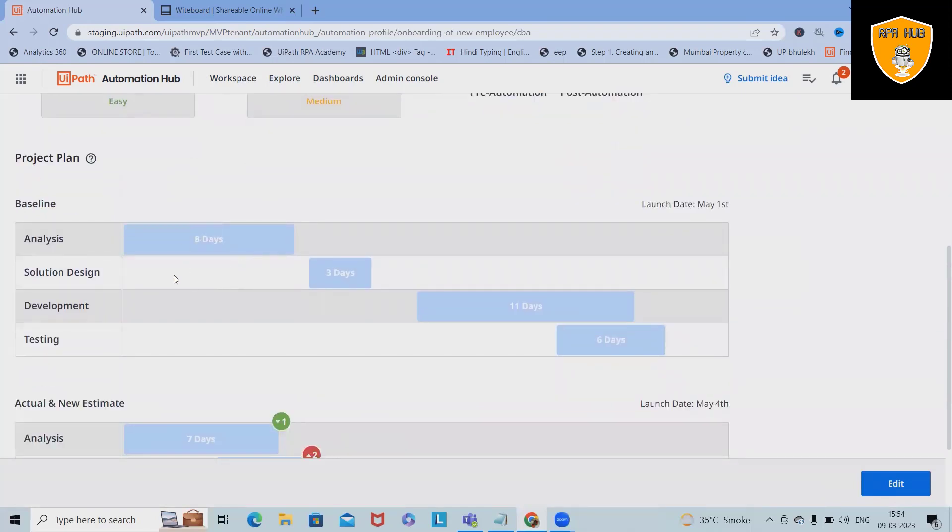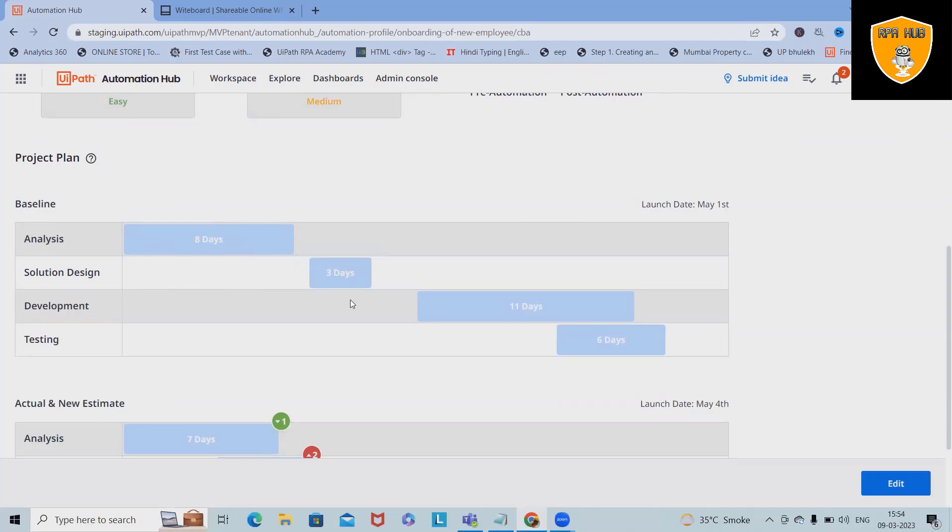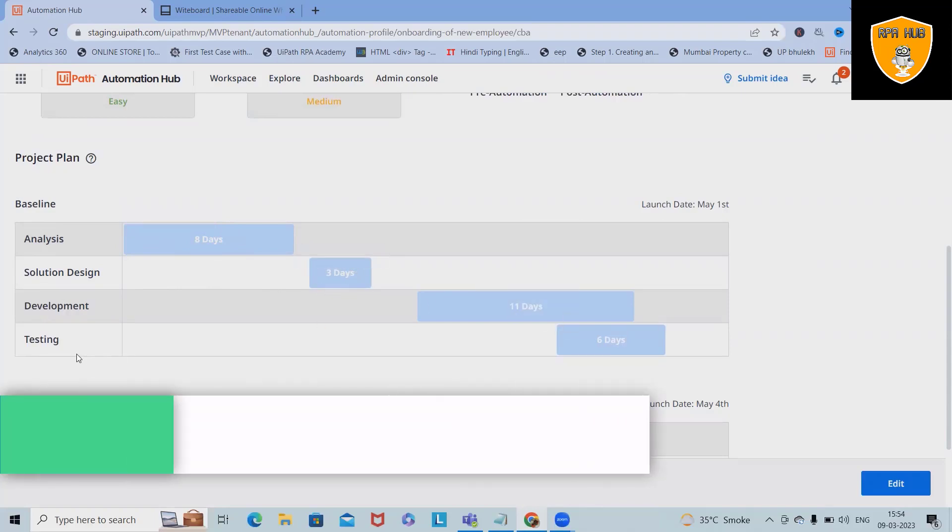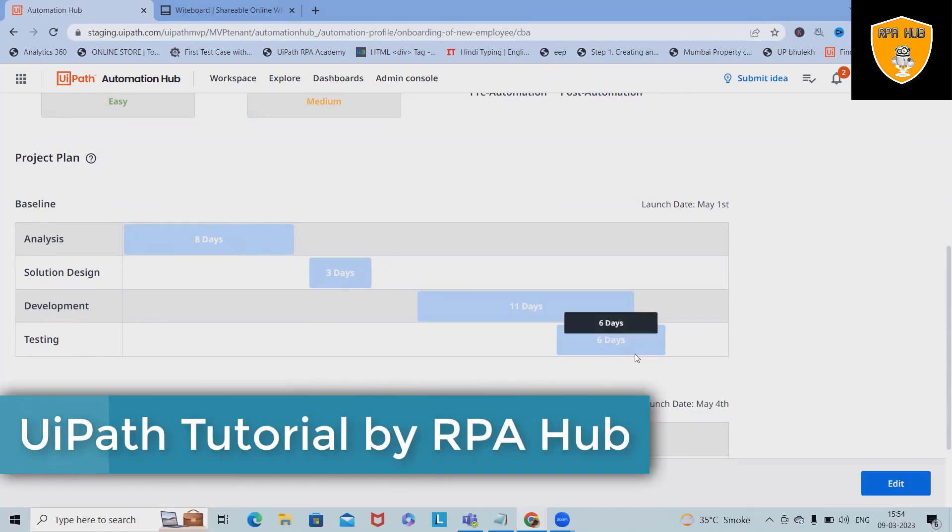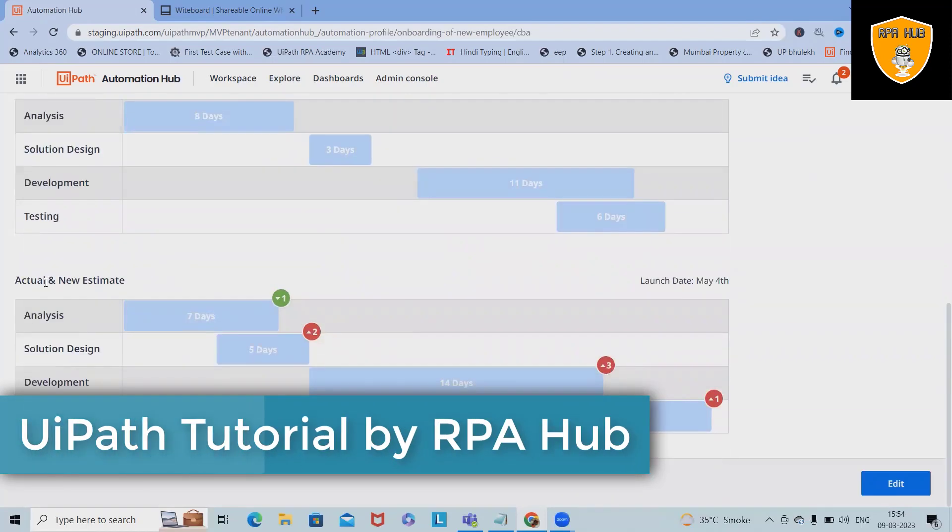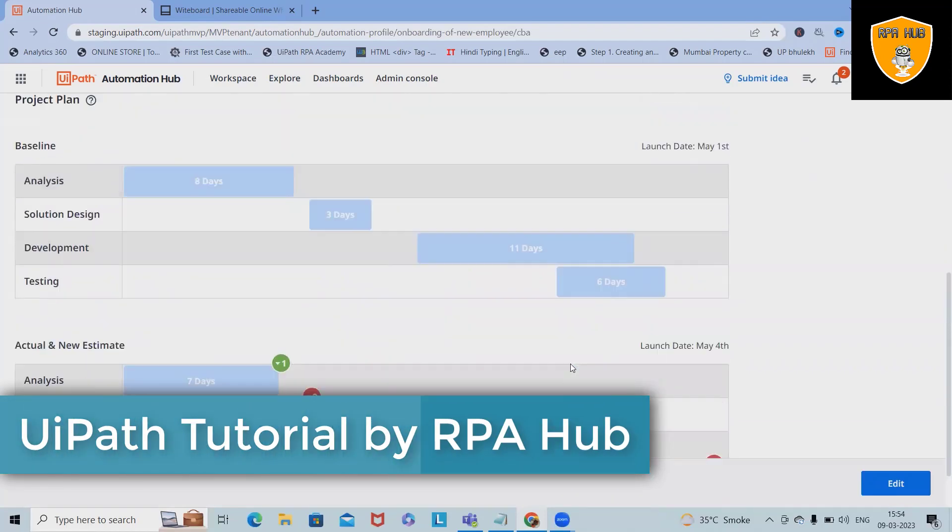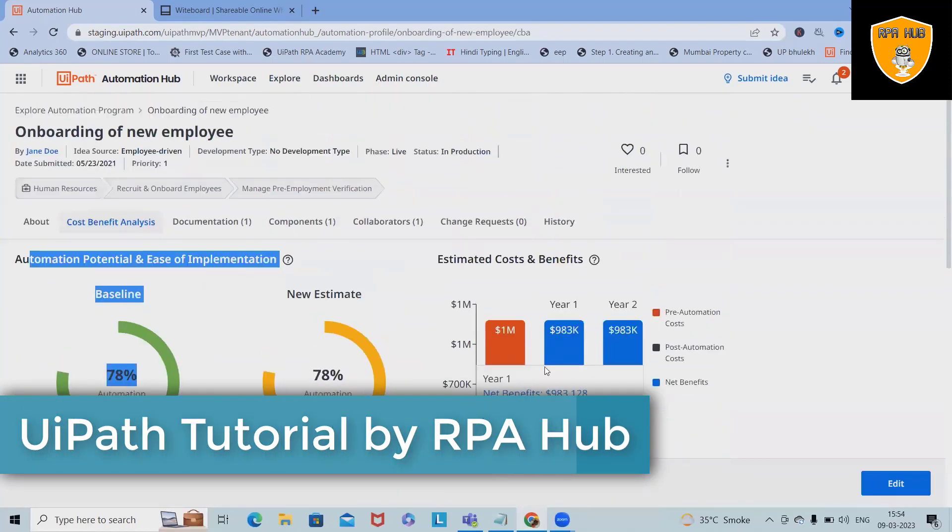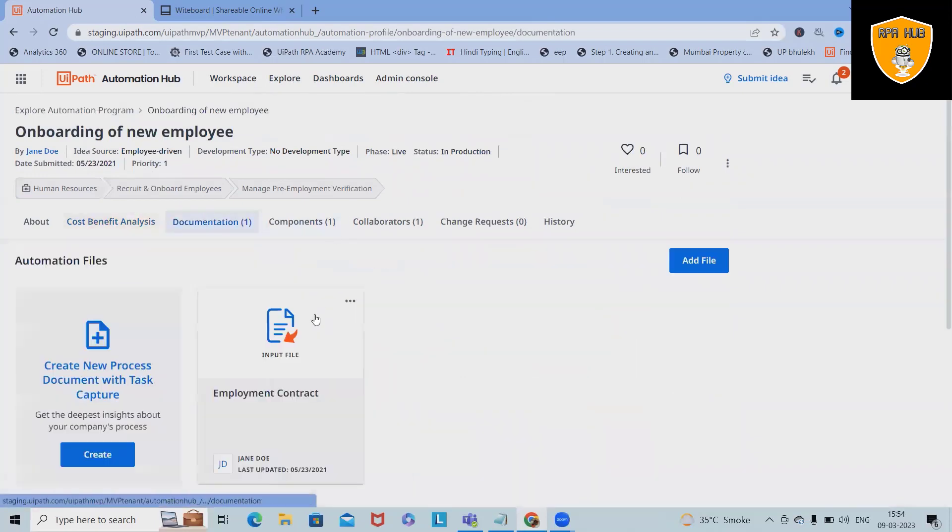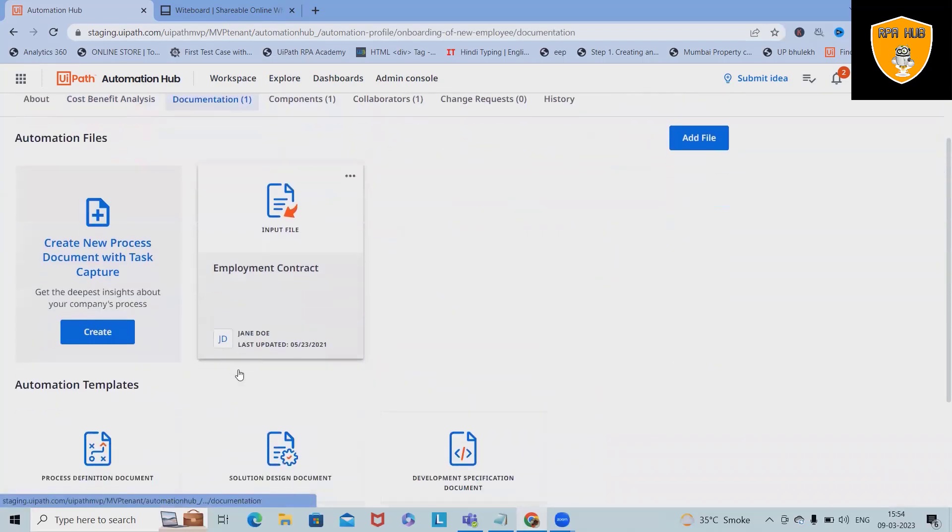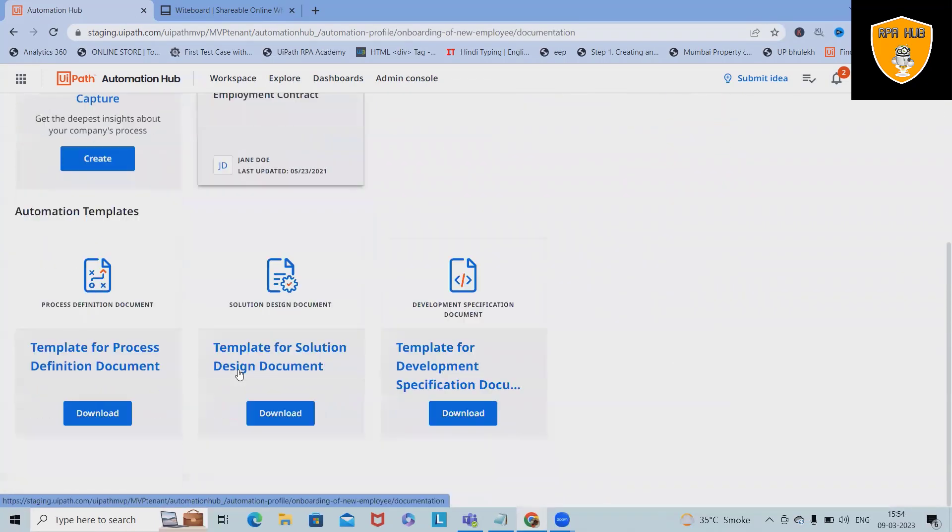You can even see in the Gantt chart about the project plan, how many days it will take to complete the process. In baseline, we have analysis which will take 8 days, solution design is targeted for 3 days, development is 11 days, UAT and testing is 6 days. This is a complete Gantt chart showing here.